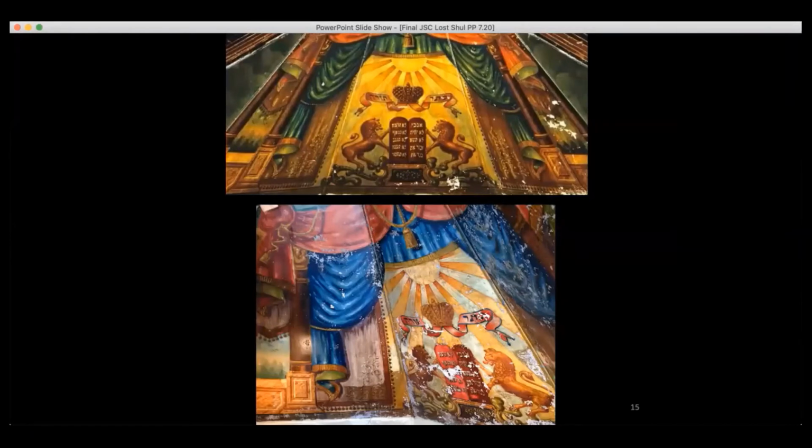Consolidation was completed and about 50% of the darkened varnish was removed by the end of May 2014. Cleaning was not completed at this time, as funds were still being raised to cover the cost of conserving and moving the mural. The cleaned windows created by removing discolored and dirty varnish layers helped fundraising efforts, as they were tantalizing clues to the colors yet to be uncovered.